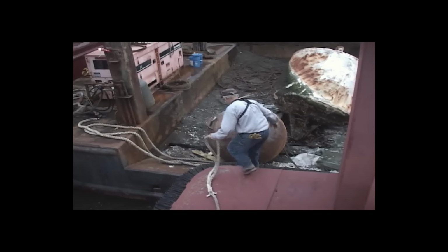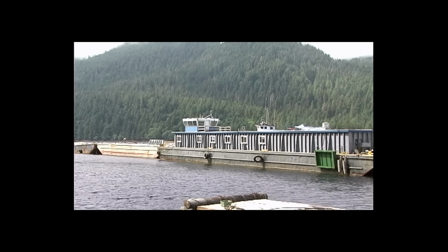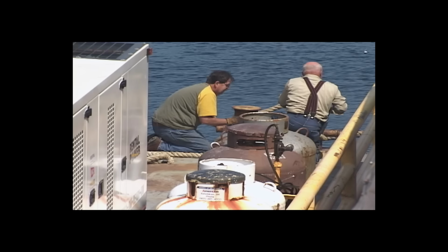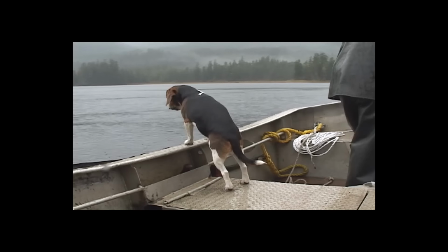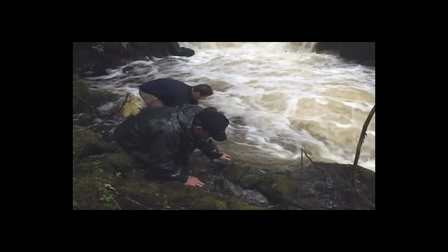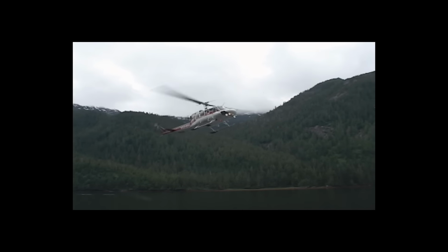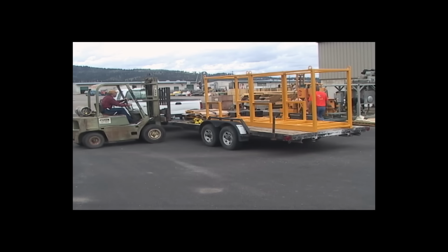Being this far back in the wilderness means that everything needs to be available from this camp. Forest Service rules would not allow camps on shore, so it all needs to happen here off of these decks. With the barges rafted together and anchored just offshore, water was located and plumbed to the camp. Materials were staged temporarily at an old logging site ready for use. Then helicopters and more crew began to arrive, and it was time to start flying and drilling foundations.